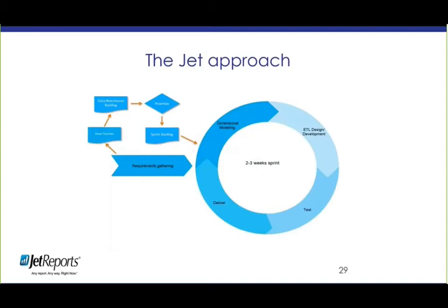And we look at priority number 1, and we time box it. We say, we think that's going to take us a day to produce that report or that set of data. Or we think it's going to take us 5 days, or we think it's going to take us an hour. And then once we get that first priority time boxed, we don't go off into a dark room and start writing code, because we don't have to. Right? That part is automated. What we do instead is we start delivering stuff. Priority number 1 first, and then number 2, and then number 3, and so on.